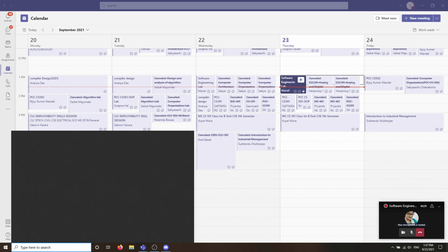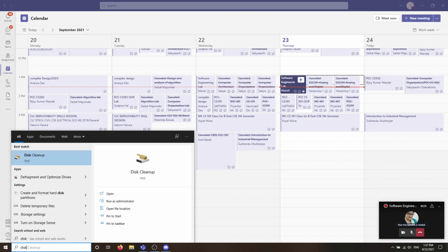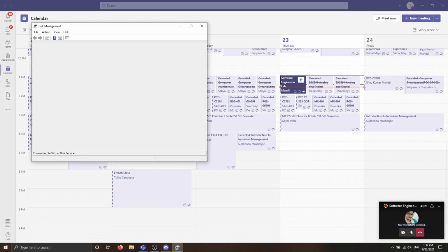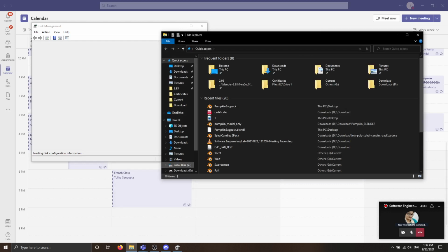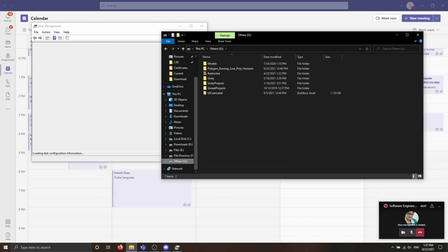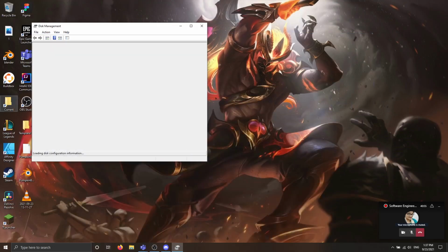Actually, the development team is roughly the same for all the categories of products. For example, a 60 kilo lines of code program can be developed in approximately 18 months, regardless of whether it is organic, semi-detached, or embedded type. So there is more scope for parallel activities for system and application programs than utility. Here, this is an example given.